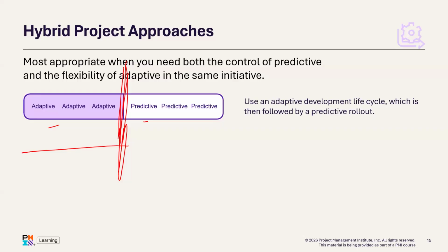You have to be in a cycle to be able to deliver a resource. And once you are able to define the resource, then you can be more predictive in the mining, in the extraction stage, because that process has been done multiple times before. You know your expectation, what you need to deliver at each stage. So you can be more predictive in the extractive stage. Right. I think I agree with you.